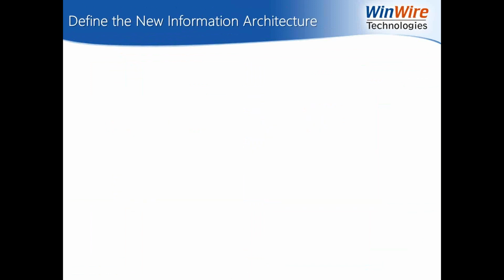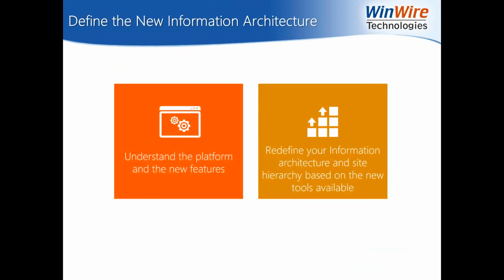One of the key features that I personally insist on, and that's why you saw that example early on, is to spend time in defining the new information architecture on SharePoint 2013 as a parallel path ahead of any migration project. What I mean by that is understanding, I've already said this, the new features, but also how the entire site structure as well as the content structure is going to be organized, and leverage things like the metadata service from SharePoint 2013 to define that for use. That's just one example, but at a very high level, it's very important that the activity gets conducted.